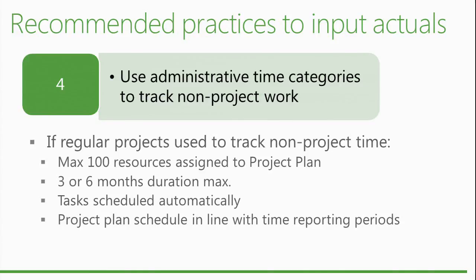Try to have tasks that are not too long, all right? Like 3-6 months maximum. We have seen some admin projects where tasks were like 10 years, for example, with 300 resources on it.